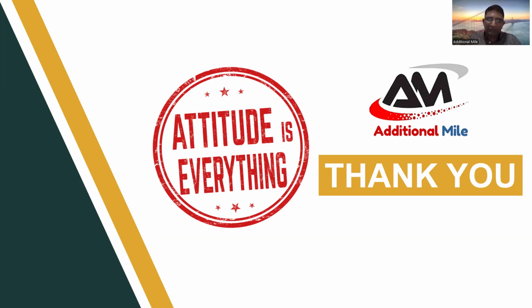In our projects, wherever I have done consultancy, and wherever I was myself the QC manager, we have introduced this in monthly review meetings: this month this was our cost of poor quality. Try to use this. It can even create an Excel sheet for you. It will give you the actual cost you could have saved if you had done it right the first time.